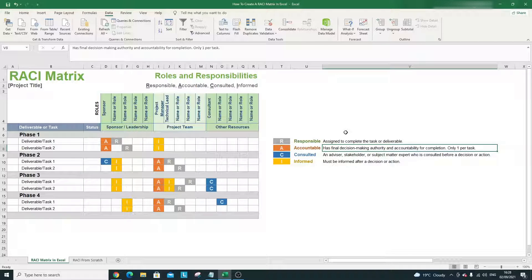Next we have C, which stands for Consulted. That individual is an advisor, stakeholder, or subject matter expert (SME) who is consulted before the decision is made on that task or deliverable. And lastly, I stands for Informed — that individual must be informed about a decision or action for that particular task.